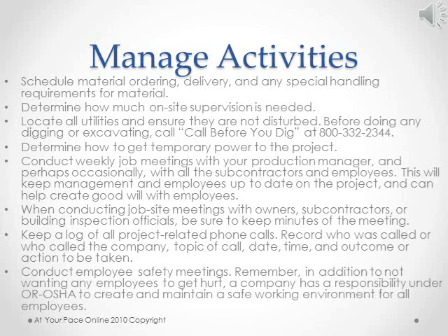Conduct weekly job meetings with your production manager and perhaps occasionally with all the subcontractors and employees. This will keep management and employees up to date on the project and can help create goodwill with employees. When conducting job site meetings with owners, subcontractors, or building inspection officials, be sure to keep minutes of the meeting. Keep a log of all project-related phone calls. Record who was called or who called the company, topic of call, date, time, and outcome or action to be